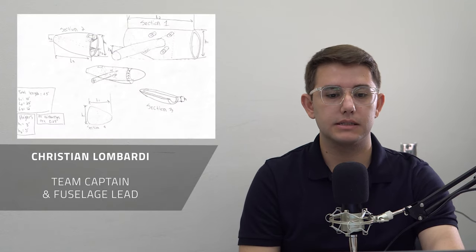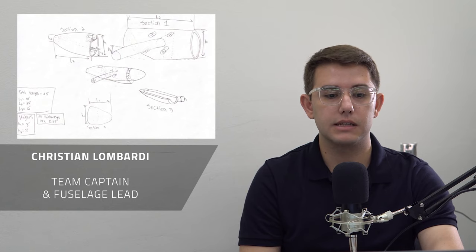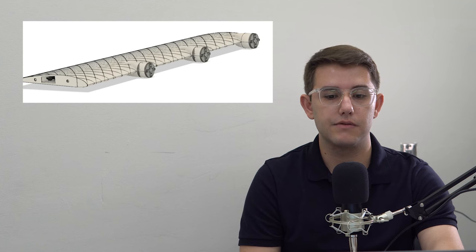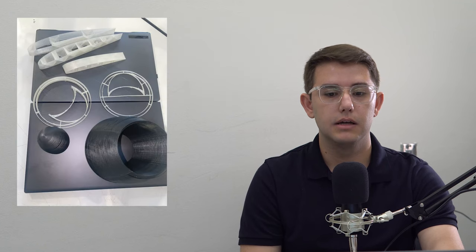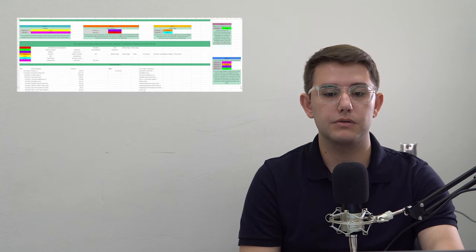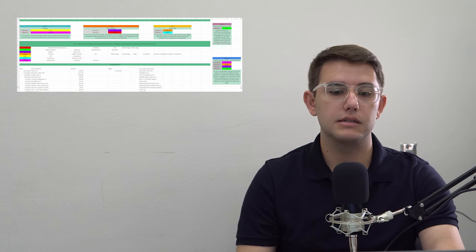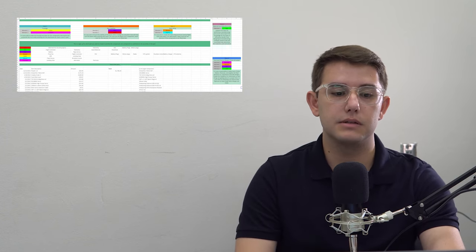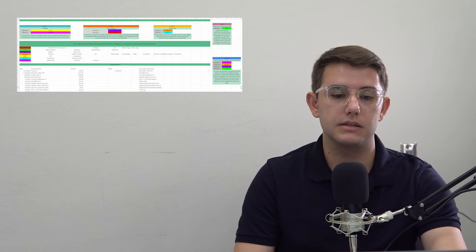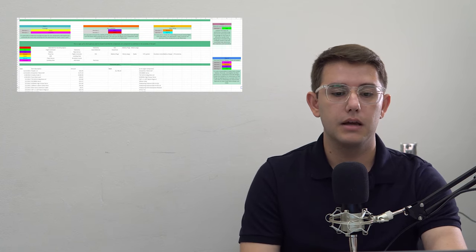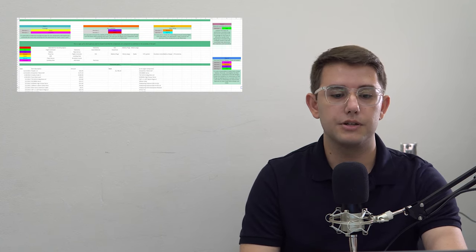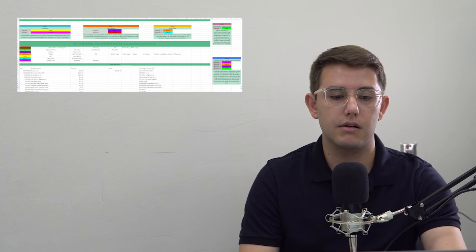When we started the design process, we decided to split our group into four teams: the fuselage, the vertical stabilizer, the main wing, and pre-processing materials and manufacturing. Since the groups were split up with two people in each team, the workload and responsibilities were delegated throughout the group evenly, making the decision process smooth since only two people would design a single section and not all seven of us. Each group had one person to communicate with the other groups for information and calculations, as well as the full design of the section for the aircraft.